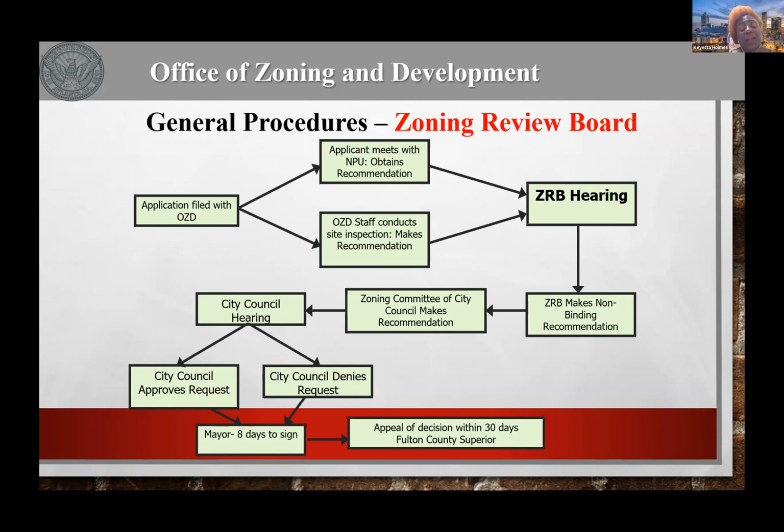It is a pre-development meeting, and it is required prior to the submittal of a rezoning application or of a subdivision application. An applicant is required to attend that meeting and provide their site plan. At that meeting, all of the review agencies, including zoning, buildings, fire, watershed, and transportation, provide comments to an applicant who is proposing a development.